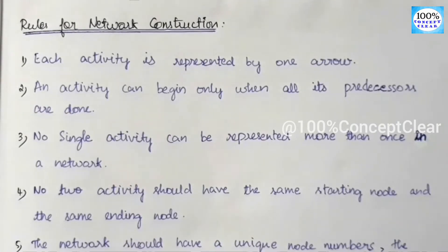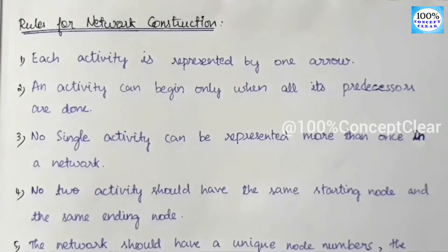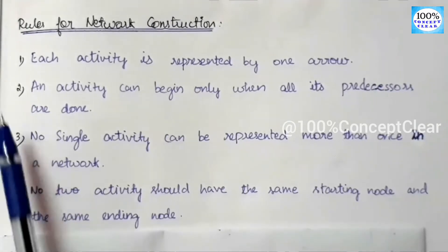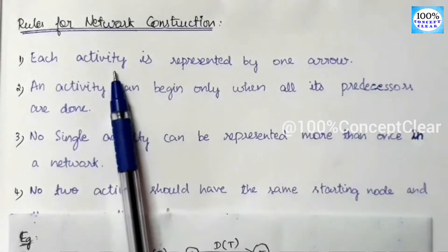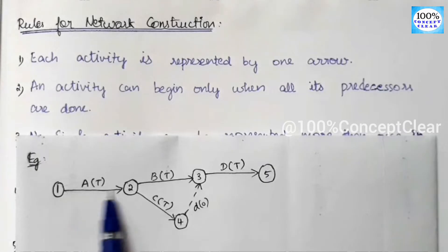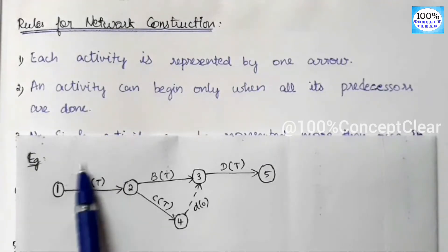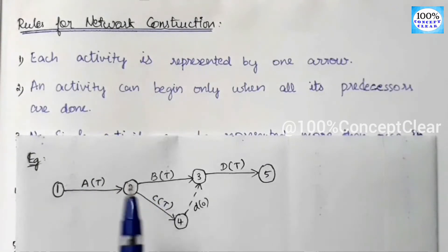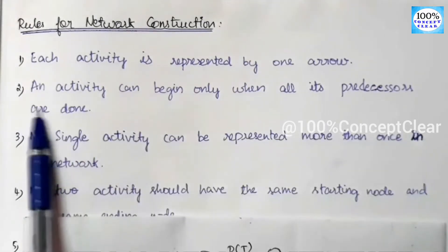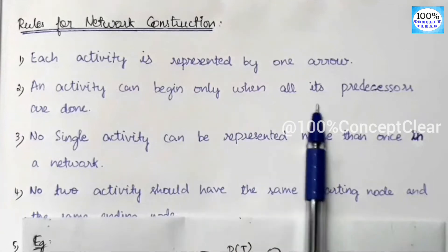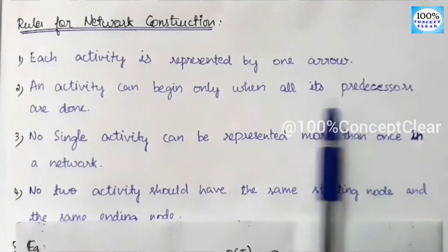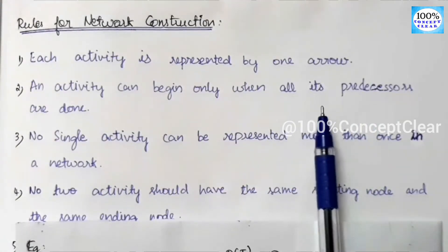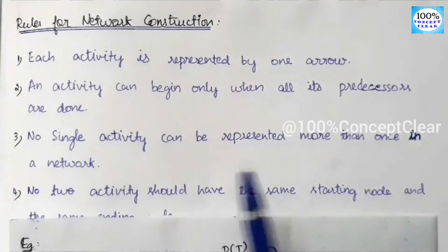The next topic is rules for network construction. The first rule: each activity is represented by one arrow only — one activity corresponds to one arrow. The second rule: an activity can begin only when all its predecessors are done. Before we begin any activity, the predecessor activity must be completed first.